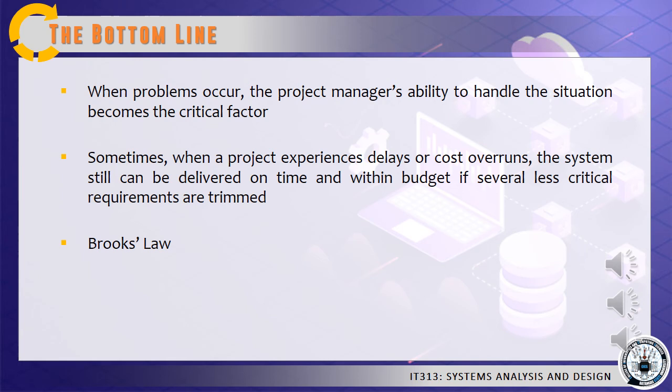If a project is in trouble because of a lack of resources or organizational support, management might be willing to give the project more commitment and higher priority. For example, management might agree to add more people to a project that is behind schedule. Adding staff, however, will reduce the project's completion time only if the additional people can be integrated effectively into the development team. Adding staff can mean training and orienting the new people.